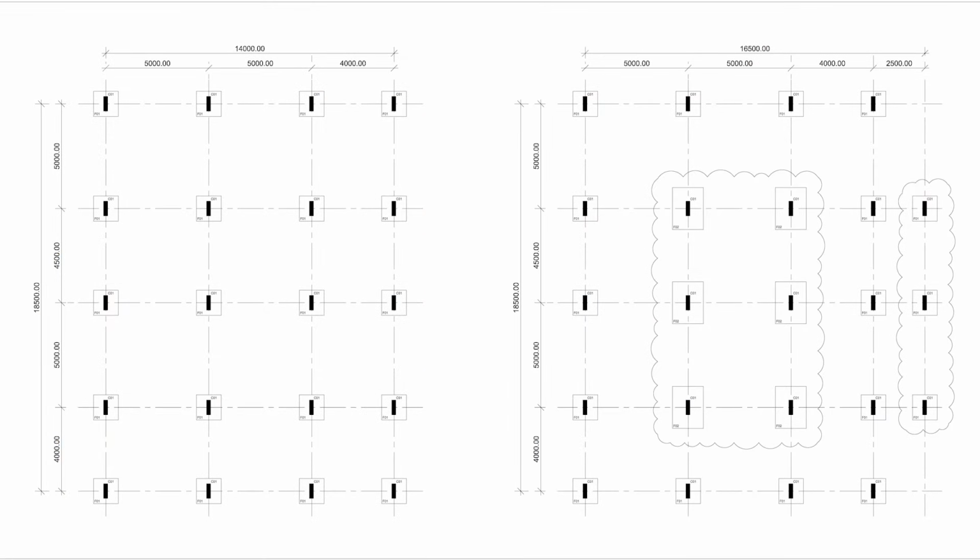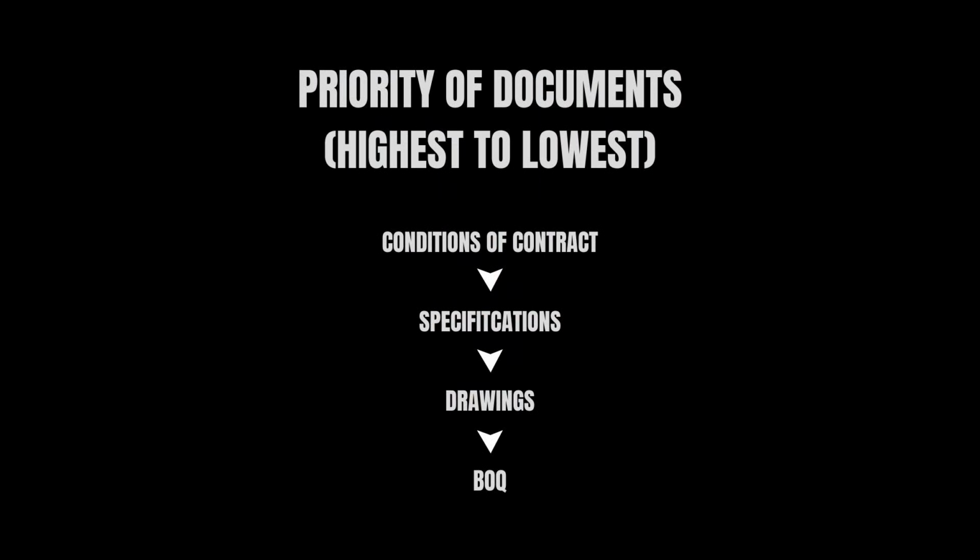When something is new to these documents, or when you change something that is already available or coming in these documents, then this is a variation, because the client cannot change everything he needs. You have a contract and there are contract documents that define the scope. If we need to change anything that is in the contract or in any of the contract documents, then it becomes a variation.